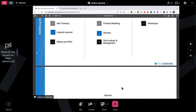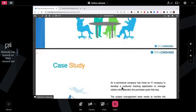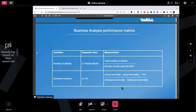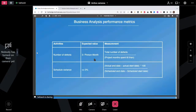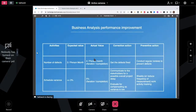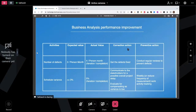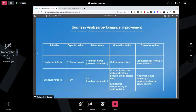For example: number of defects expected is three per month, actual was four — corrective action is to get the defects fixed, preventive action is to conduct regular reviews to prevent defects. Scheduled variance expected is less than 3%, actual was 5% — corrective action is to communicate to stakeholders about the possible delay, and preventive action is to do weekly review sessions to stop it from happening.